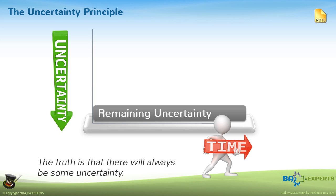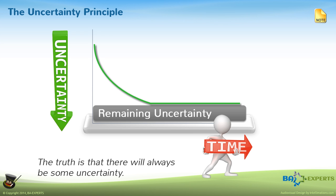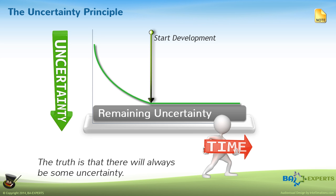The real problem here is the pace at which the project reduces uncertainty. This green line shows how we expect uncertainty to drop — it drops very rapidly at the beginning. That is what we call the analysis phase, and then at some point it starts to level off. At that point, further analysis is useless, so it's time to start development. Obviously, uncertainty is now well contained. And if you try to reduce all uncertainty, you'll be in analysis paralysis very quickly.